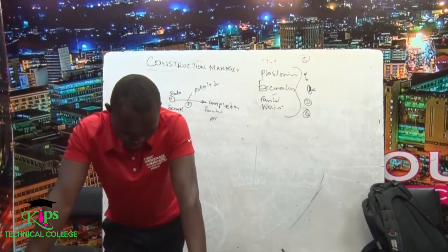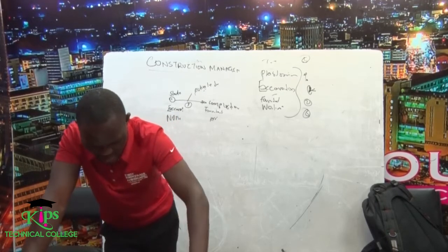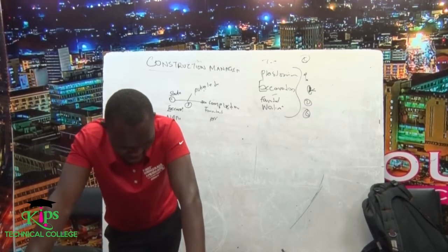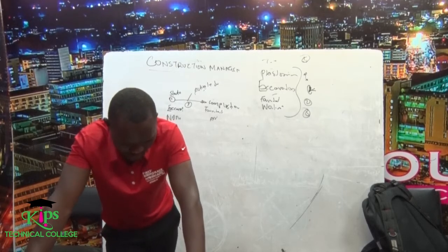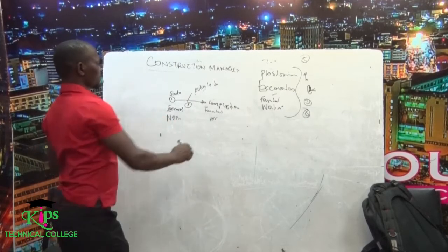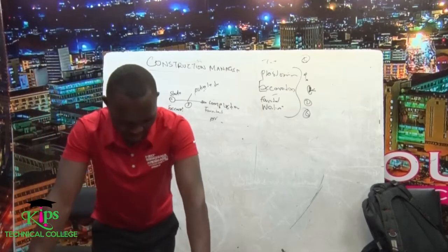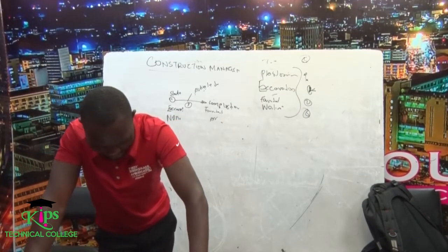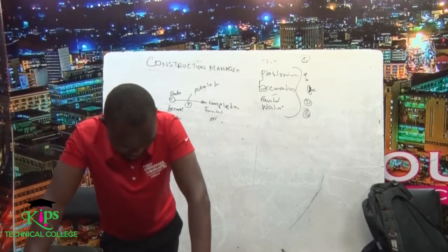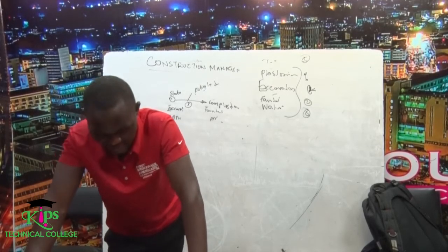Another property is that an arrow is designated by two numbers, and the number at the head is always greater than the number at the tail. Then another property is that the length and the shape of the lines and arrows do not give any significance.